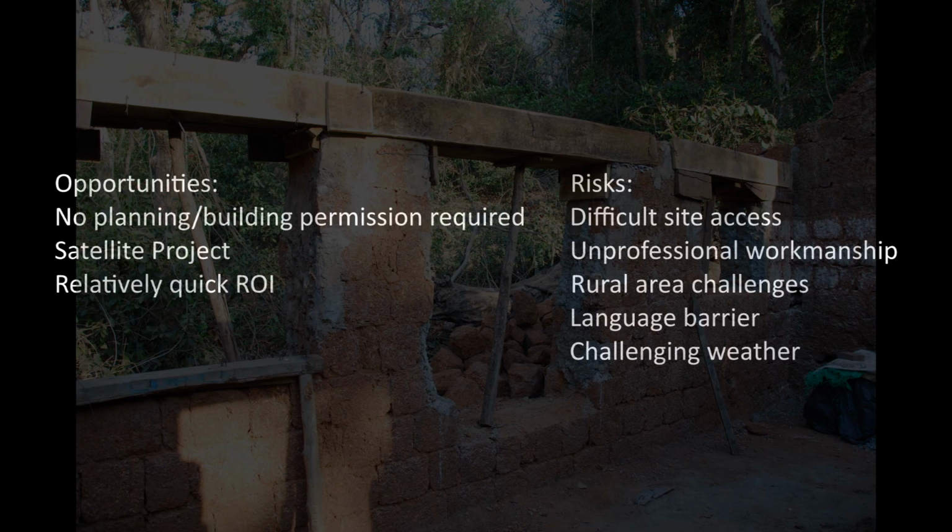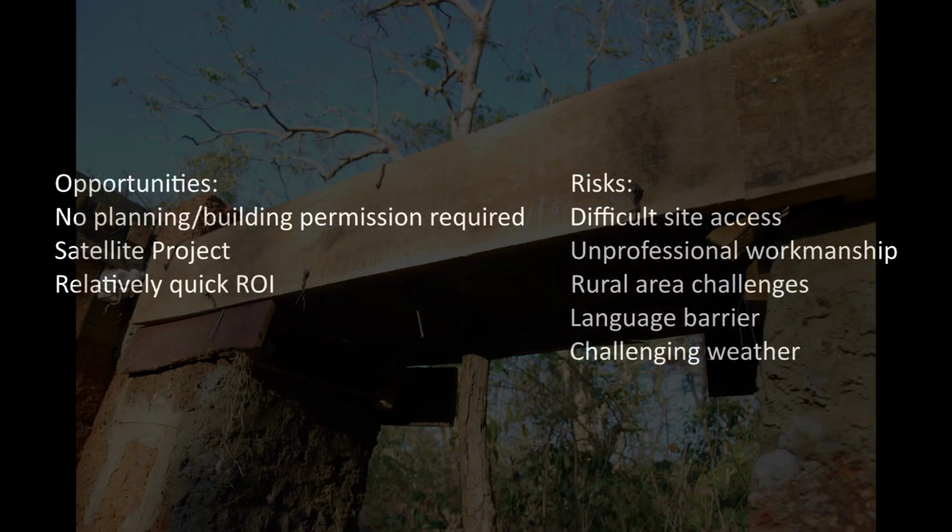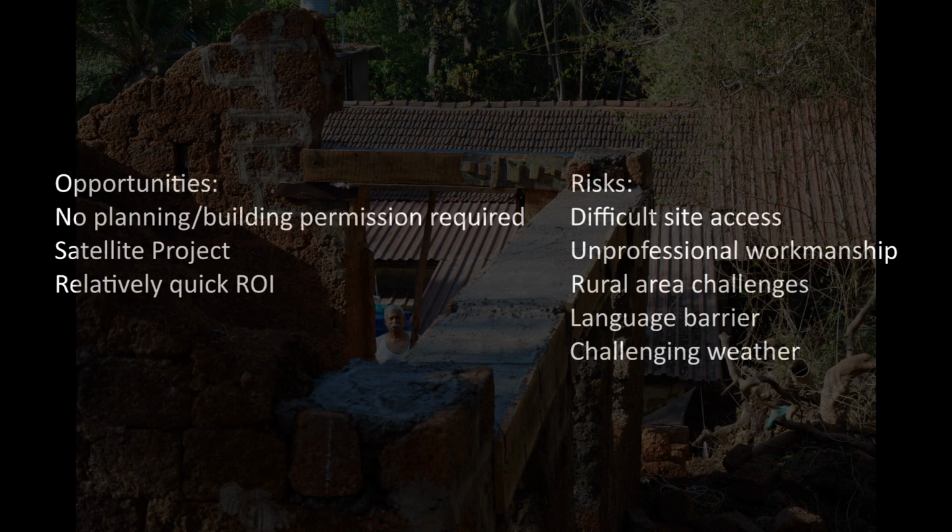And finally, the weather also plays a big part in this because there's extremely challenging weather. So all the major work has to be completed before the monsoon rains, as everything slows down during that period. Effectively, we have to push to complete the work in the summer, and it's really very hot, difficult, sweltering conditions before it gets too wet to do any work. And these are the main risks that can topple the project timeline.